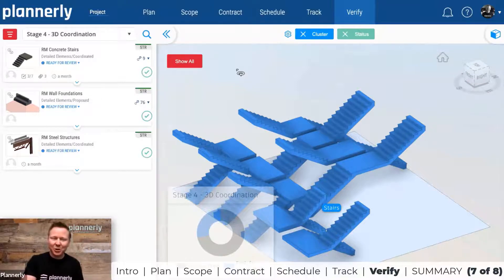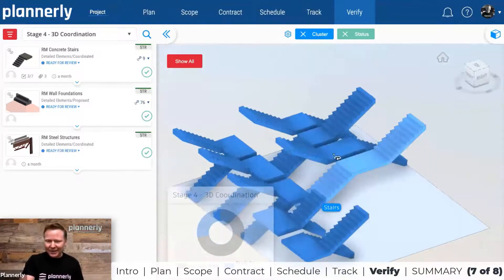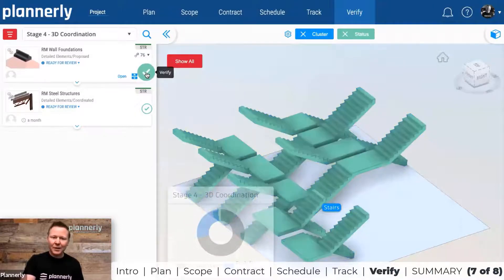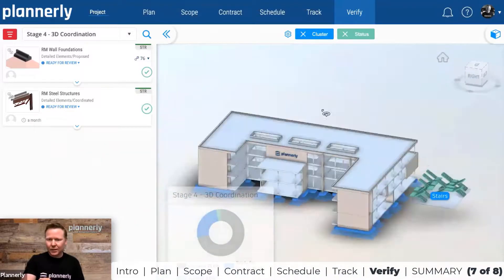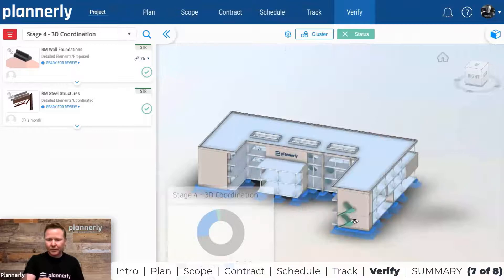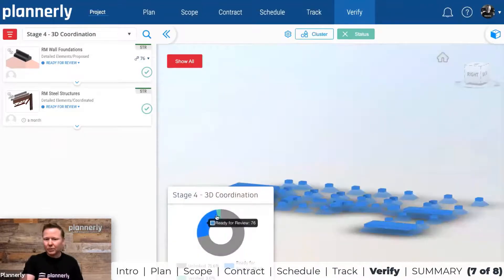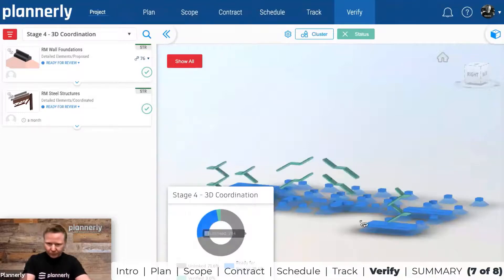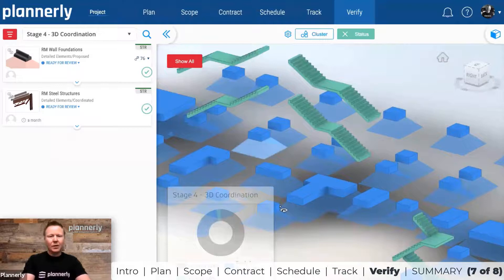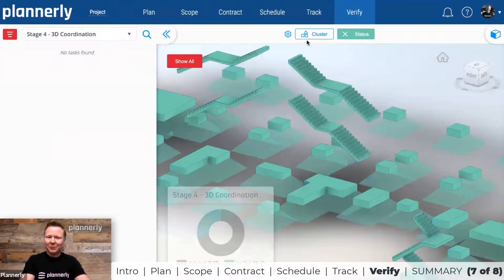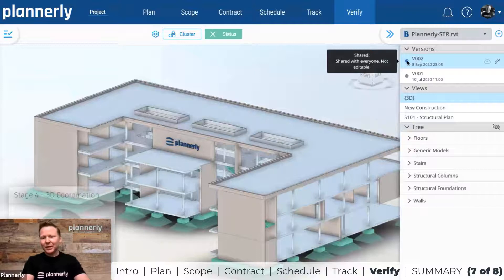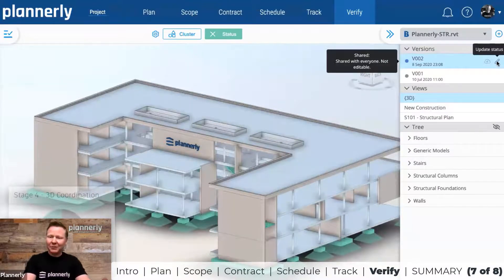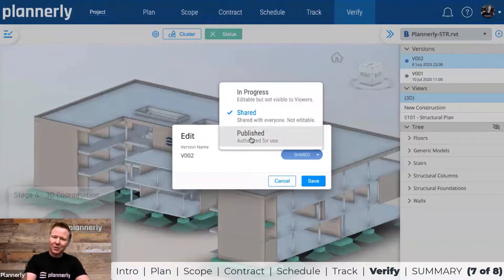Once we're happy everything looks good, we can simply verify the task and elements will start turning green — or whichever color has been chosen. As we show all elements and put the stairs back in the building, more and more of the model turns green. The ideal is that everything becomes reviewed and green, meaning the model is ready to be published. We would then publish version two so others can download or access it directly inside BIM 360.